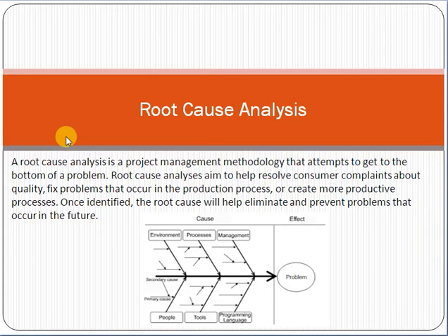Another reason is that because they don't have clear visibility about the project, about the scope of work, their interest in the project was very low, because they don't know what's going on, what to implement. So that was the reason that the development team was not fulfilling the requirement, and they were not delivering the task on time. Due to that reason the project was delayed.